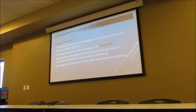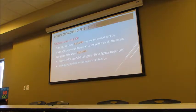That's the way I understand it today. So today it's 10, and in the future, it looks like it's going to 50. By law, we have to do it at 50. I don't know if you're familiar with the Management Budget Act, which specifies that. It says if the solicitation is for 50 or more, it must be posted publicly for 14 days. So by policy, we're going lower than that, but it looks like we're going to go to 50.